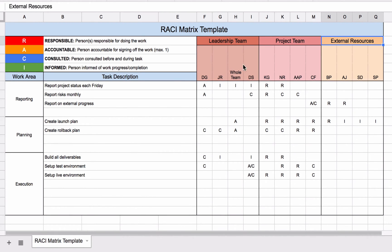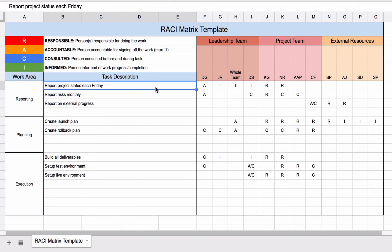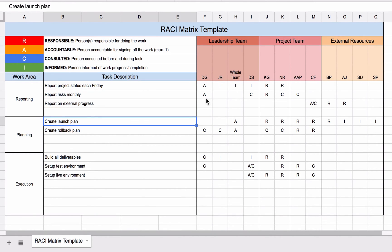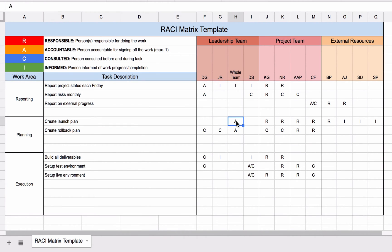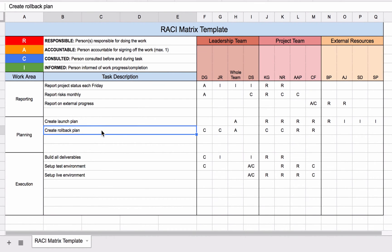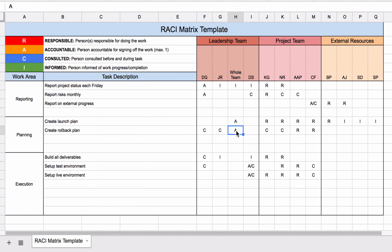Where a RACI matrix really comes into its own is when different tasks span an organisation. You can see here different areas: the leadership team, the project team, and external resources, with individuals defined by their initials. The leadership team is treated as a whole group. Looking at the 'create launch plan' task, there's just one accountable person and multiple people responsible for creating it, plus parties that need to be informed. For the rollback plan, the same person is accountable, two people are responsible for doing the work, and several people here will be consulted.